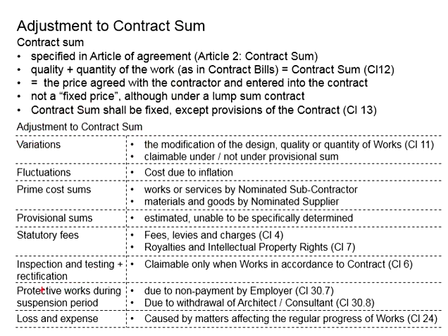Another situation where the suspension of work can occur is when the architect or the consultant withdraws from the project, with no supervision by the architect and the consultant. The project cannot proceed. That will be a compulsory suspension of the work, and this is not the fault of the contractor. With that, adjustment to the contract sum is allowed.